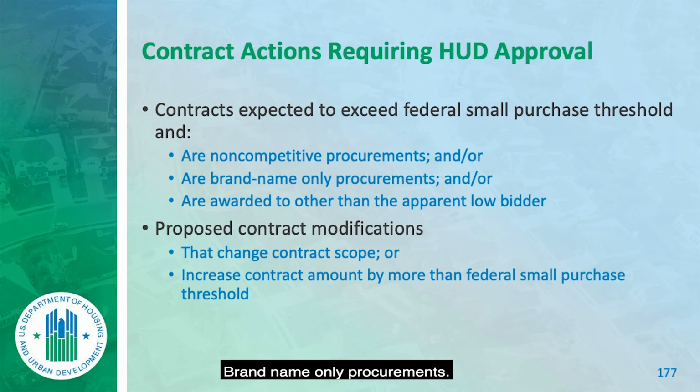Brand name only procurements. Now remember, if you say brand name or equal, it is not brand name only. It's "or equal." So this did not say brand name procurements, it says brand name only.